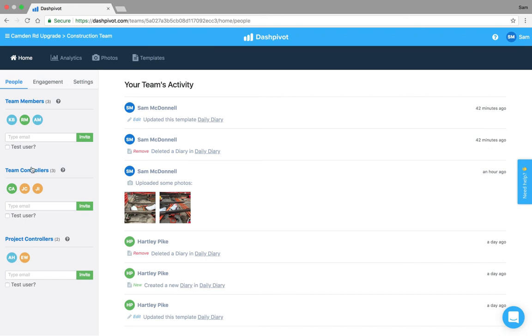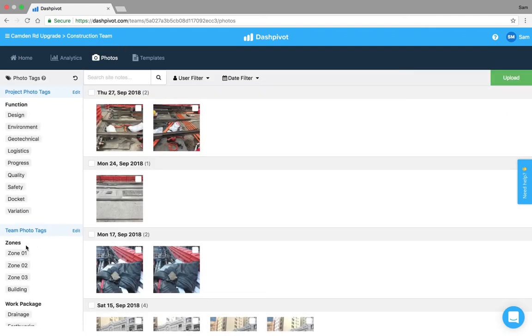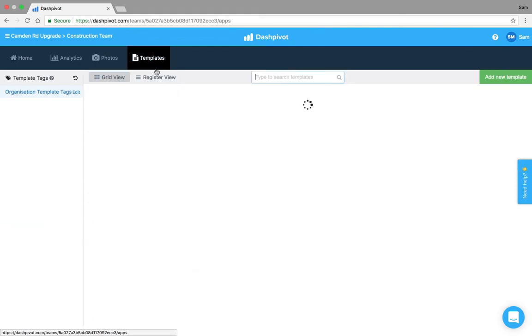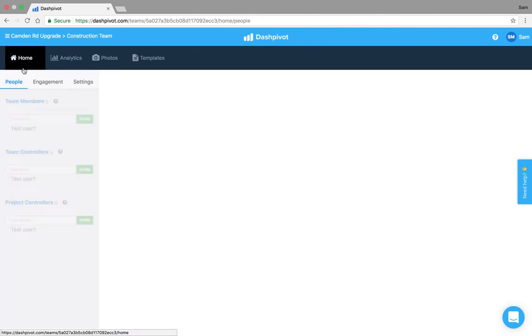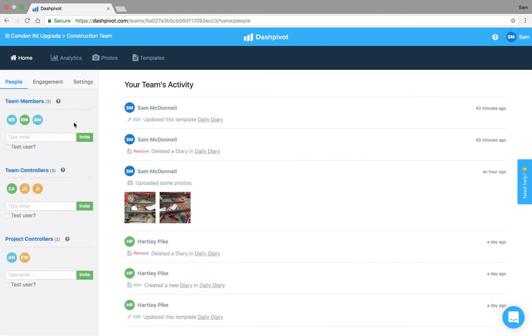Next up we've got team controllers. These people have more control over what happens in this team. They can set up the photo tags here, the team photo tags, they can set up templates within this team and they can add other people. This is usually reserved for your senior project engineers or your project manager, that's usually who we set up as team controllers.